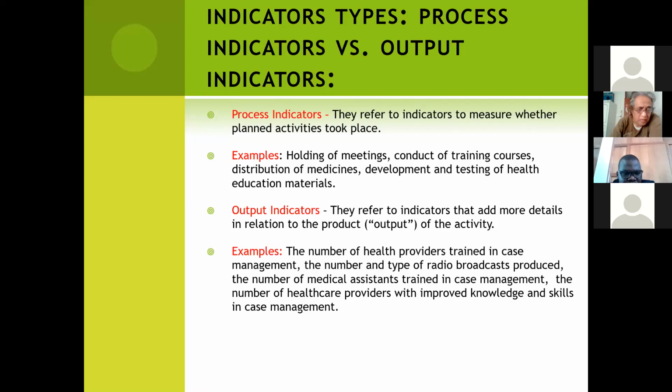A very good example of some of these indicators is the number of health providers that are trained in case management. That really becomes very important. Also the number and the type of radio broadcasts that are produced, the number of medical assistants that are trained in case management, and the number of healthcare providers that have improved knowledge and skills in case management as expected.